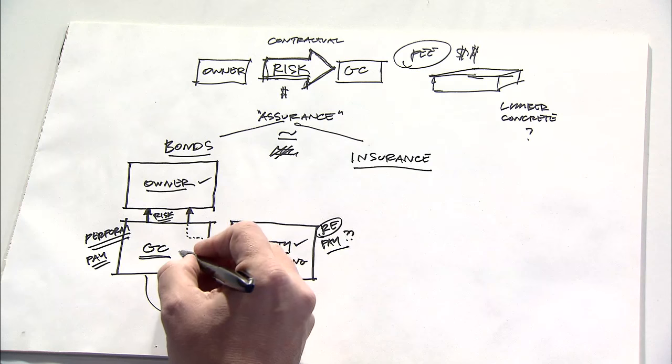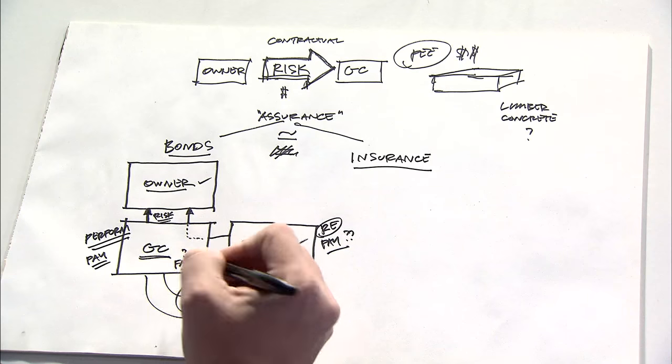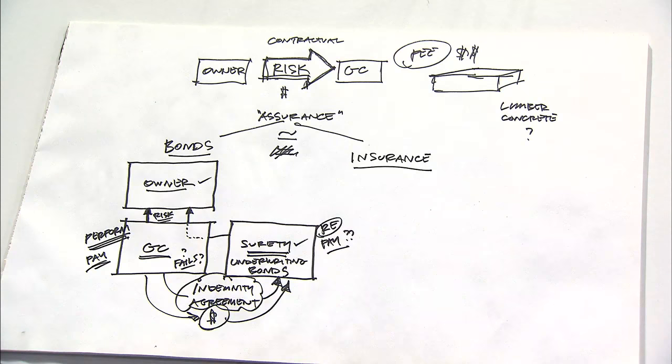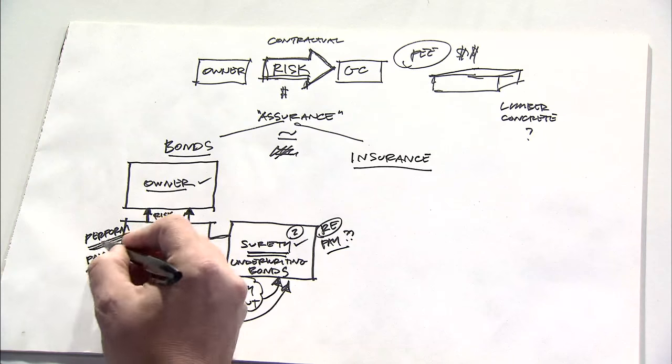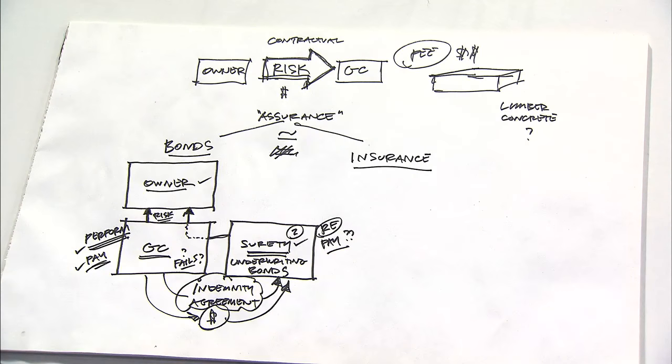Basically, what this means is that if the general contractor fails to either perform or pay, then the surety, as a second entity that's obligated, would then also be bound to the owner to both perform and pay for the completion of the project.